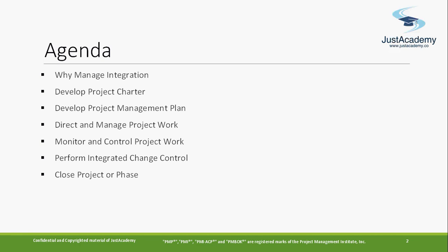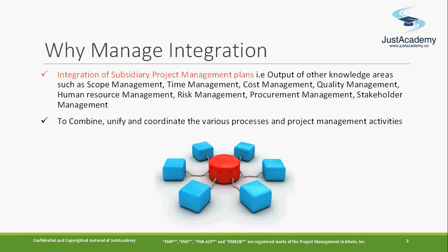And just by looking at it, develop project charter is the initiating process group, right? Develop project management plan is planning, direct and manage project work is part of execution. Monitor and control project work and perform integrated change control belong to monitoring and controlling, and close is from the closing process group. So these are the processes and the process groups they belong to.